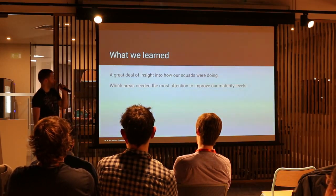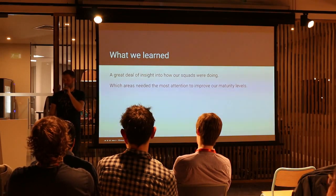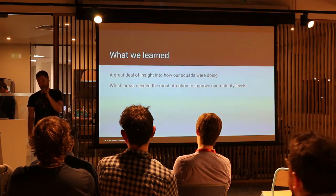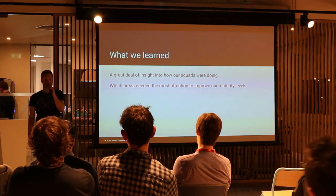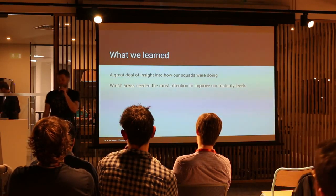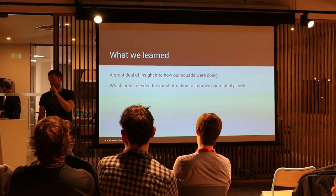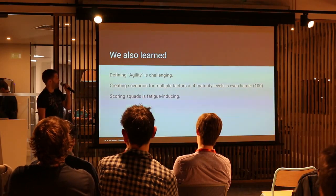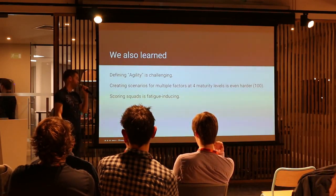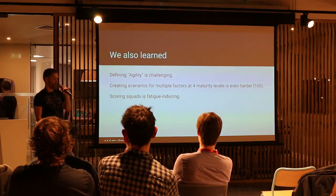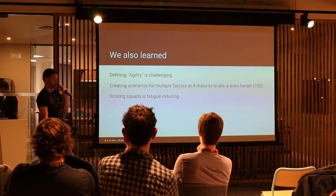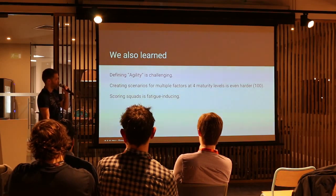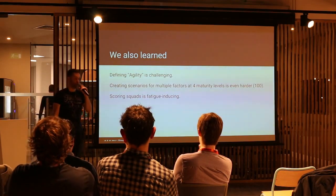What did we find out from this maturity model? We got a great deal of insight. Some squads said they didn't have as much insight into the future vision and goals as they wanted. Some squads felt they didn't receive enough feedback on the impact of the work they delivered. And some squads felt they were physically too large and could benefit from being separated into smaller sub-teams. We also learned that defining agility in and of itself is actually quite a challenging thing — creating scenarios for all of these multiple themes and the factors within them, multiplied across four maturity levels, is even harder. So there are 100 of these things to consider — it's quite heavyweight.